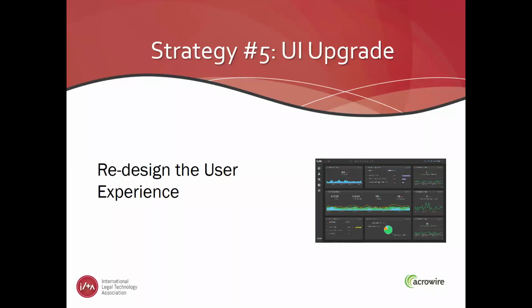You can control costs through solid requirements and pixel-perfect diagrams, and that proof of concept testing for usability before you start building. It's easy and inexpensive to create mock user interfaces and test how you think your users work before you start construction. In creating these mock user interfaces, you also learn how your employees think, how they work, what they expect, and what their biases are. Such soft knowledge is the key to building processes and systems that are easy to use and intuitive.